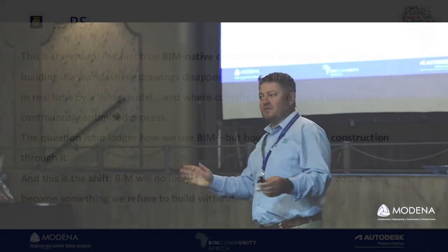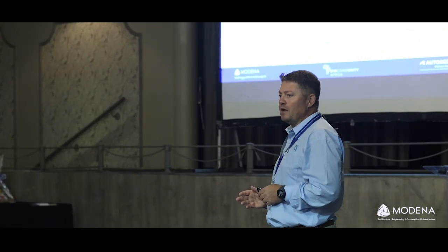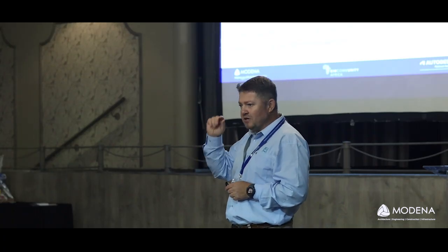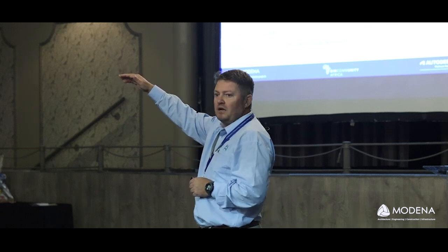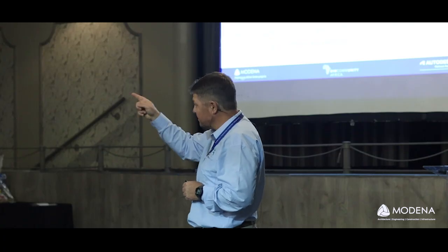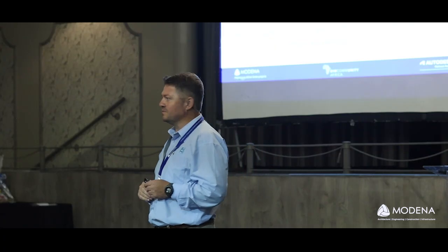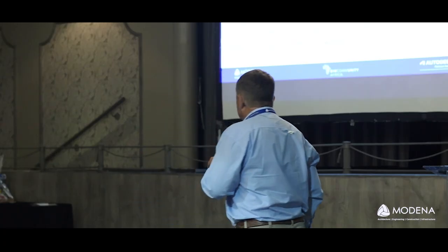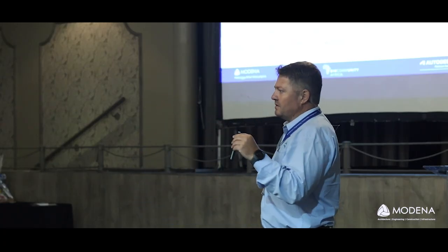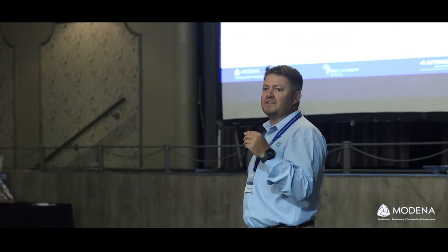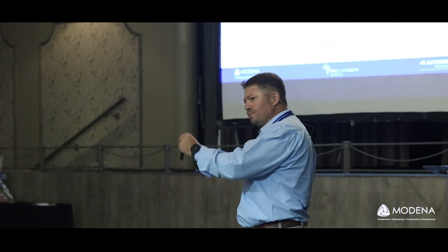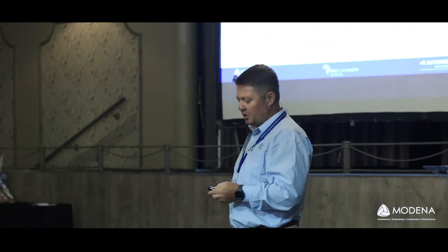Whether it is mandated or not, we're doing it on our major projects. We cannot suffer the risk. Most of the concrete that we pour is outside South Africa. We've got a contract up in Modena, the water working with BRC. It takes us 6 weeks to get a shutter from the Netherlands. If I make a mistake now, I lose money. Everything is meticulously detailed. Assets are accumulated. It's keyed, packed, shipped.